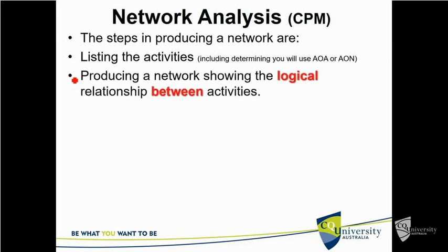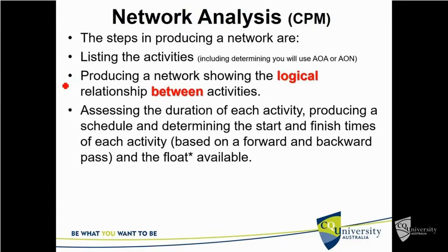So we need to show in the network the logical relationship between the activities. Okay. Sometimes I will admit some of the relationships may not seem logical on big projects, but we're keeping it nice and simple for this. And then once you've listed your activities in the correct order, in a tabulated form you'll see in a second, we have to make an assessment of the duration of each activity.